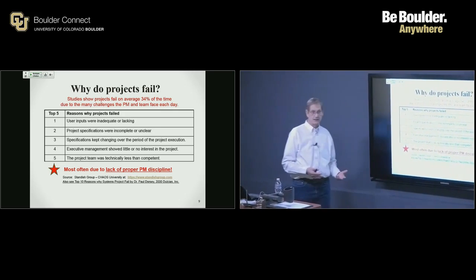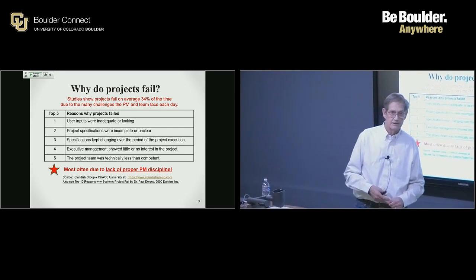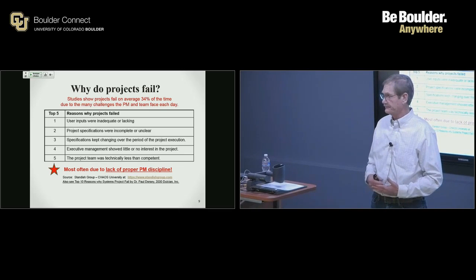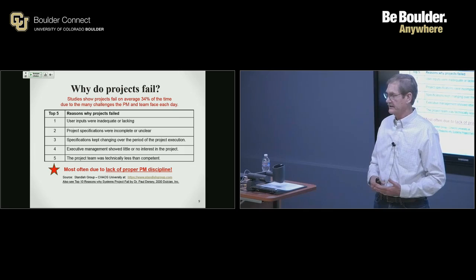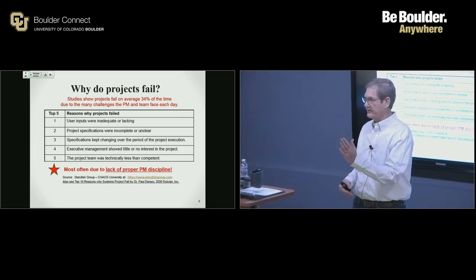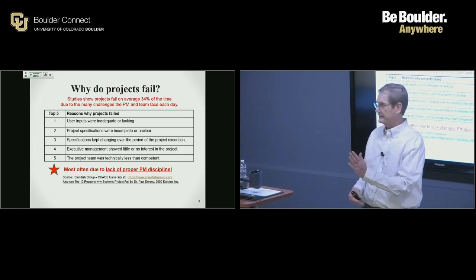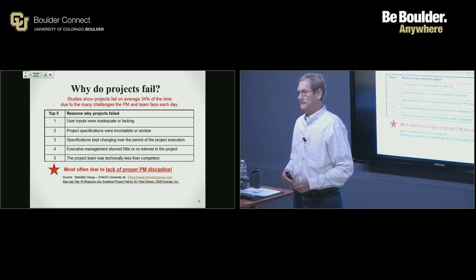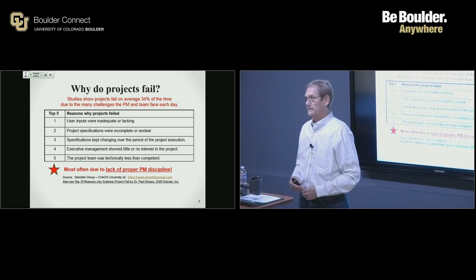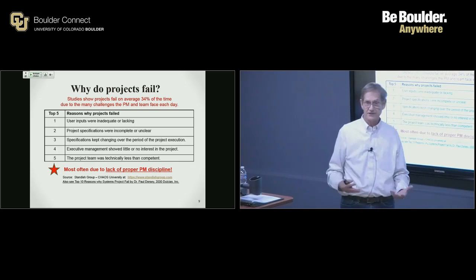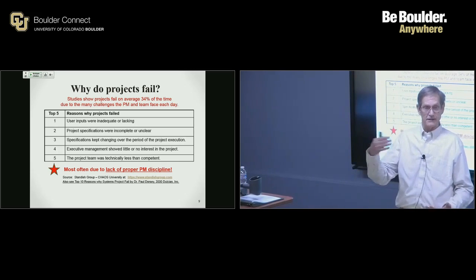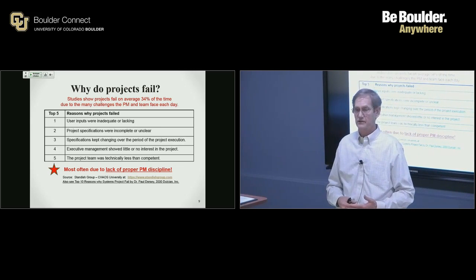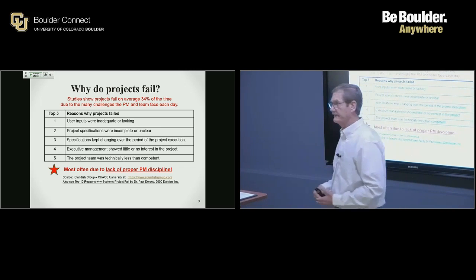And in this case, what's the other big risk here? In the example that I just gave you, what is the customer's view, Mike? What's the customer's view? 5 months into the 12-month project, they look at the work and they go, this is not what I had in mind. So what does that tell you? Yes, sir? I think one thing would be, I'm halfway through this project, I've already spent a lot of money, and I'm not even getting what I want. Exactly. So customer satisfaction and the trust and confidence that the customer has in you to manage the project really slips significantly.